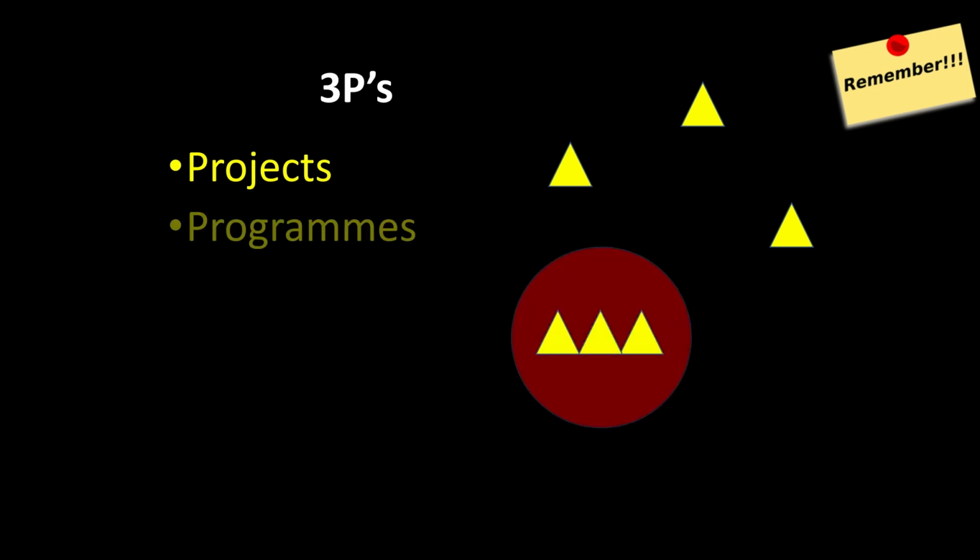And they can be all sorts of things we've already looked at. But you may have a series of projects that actually together provide an overall outcome greater than the sum of the individual projects themselves. And we might link those all together and call those a program. So to give you an example, if we were going to overhaul the IT infrastructure for our organization, we might be looking at our network capability, we might be looking at our desktop machines, we might be looking at our servers, we might be looking at our Wi-Fi connectivity, and even printers you could add on there as well.